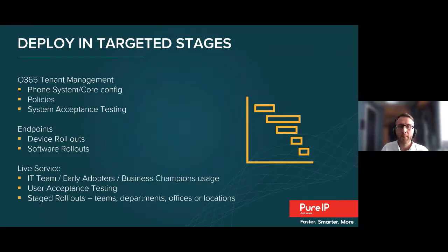Both big bang and stage migrations need prepared and tested scripts with pre-checks to ensure success. Don't get caught out by missing licenses or unplanned propagation delays during the change windows. Bulk changes and uplifts are important and featured in most migrations. However, be sure to pre-validate all the profiles and perform post-checks to ensure everything is applied and working.